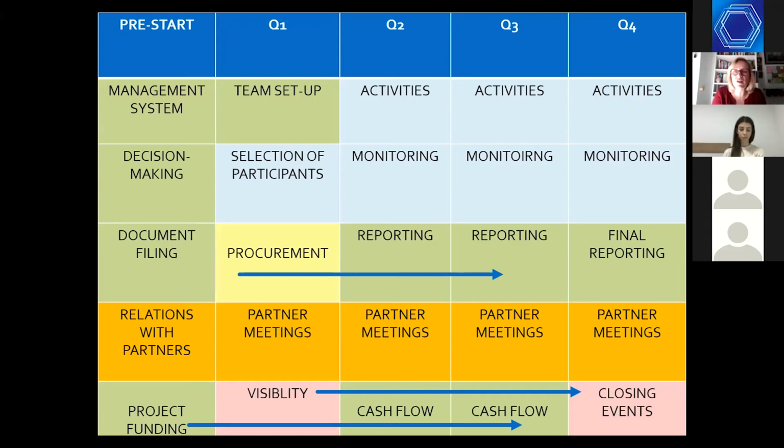This relates to the first quarter, practically starting from the first day. It also relates to when we sign the contract but are waiting for the funds to come. We might wait for funds for 1 month or a month and a half, depending on the rules of the donor. What is the donor saying to us? It doesn't matter. You sign the contract, you have to start implementing your activities. So don't wait for the money to be capable of starting.